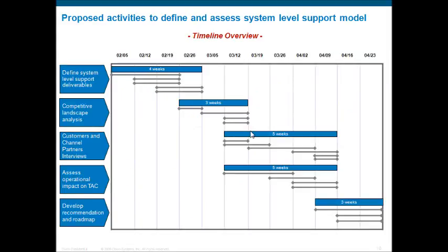What you will do then is translate the verbiage of the action plan into a visual representation in a Gantt chart, right? You can see we've got our same 5 chevrons on the left-hand side. We've got an overarching time span for each chevron. And if we then wanted to map the sub-bullets, you see those gray bars are mapped. For every bullet we had on the previous page, we have a gray bar on this page that talks about how long we're going to spend on those activities.